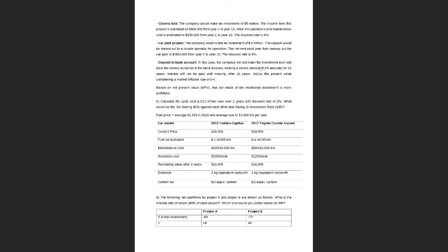Even though you're earning some interest every year, the accumulated amount will be paid to you at the end of 10 years. Therefore, you have to discount it back to the present time by considering a time period of 10 years. Okay. So even though you're making some profit annually, this won't be paid out to you.